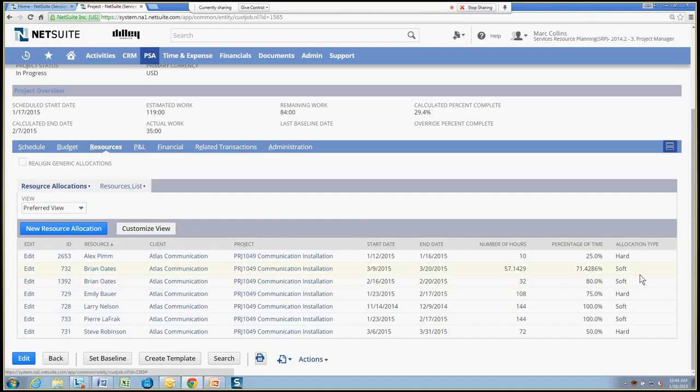And there's also the ability to determine whether somebody is soft allocated or hard allocated. Soft allocated means that their time can be moved around. It can be altered. Hard allocation is just that. The time is set. It can't be moved or changed or reallocated to another resource.